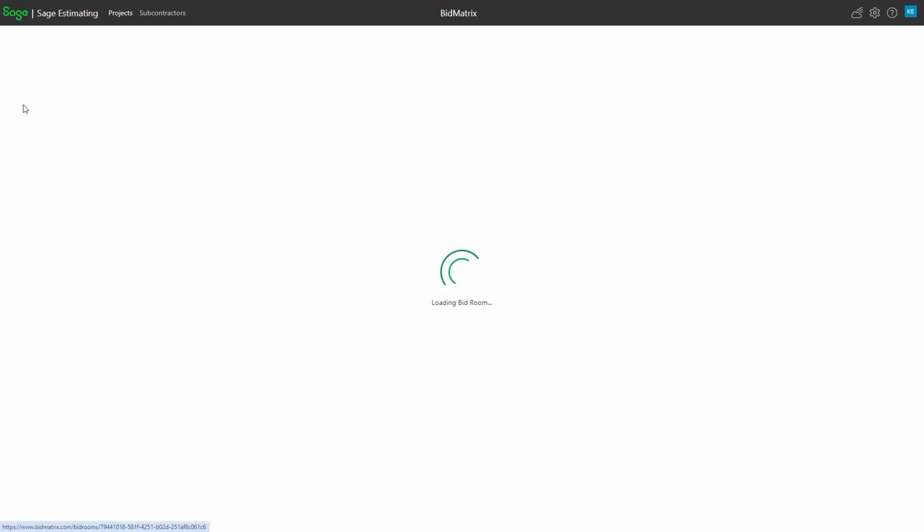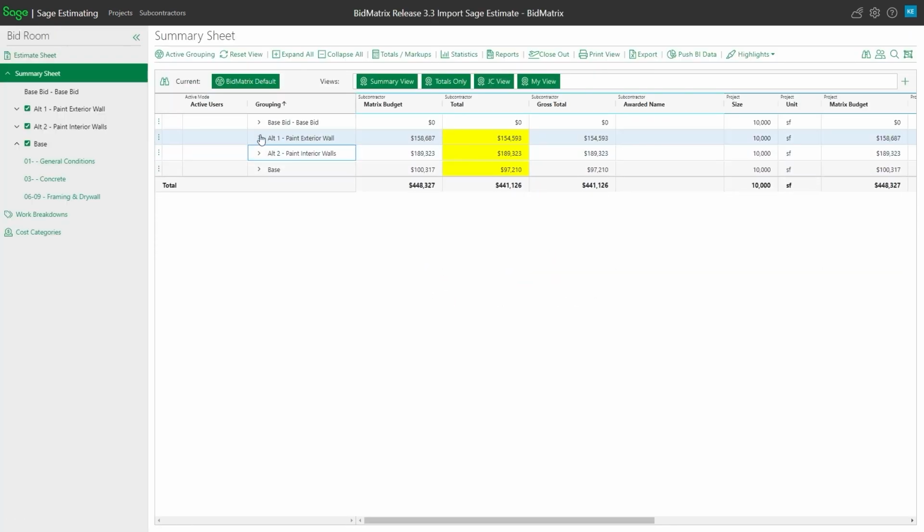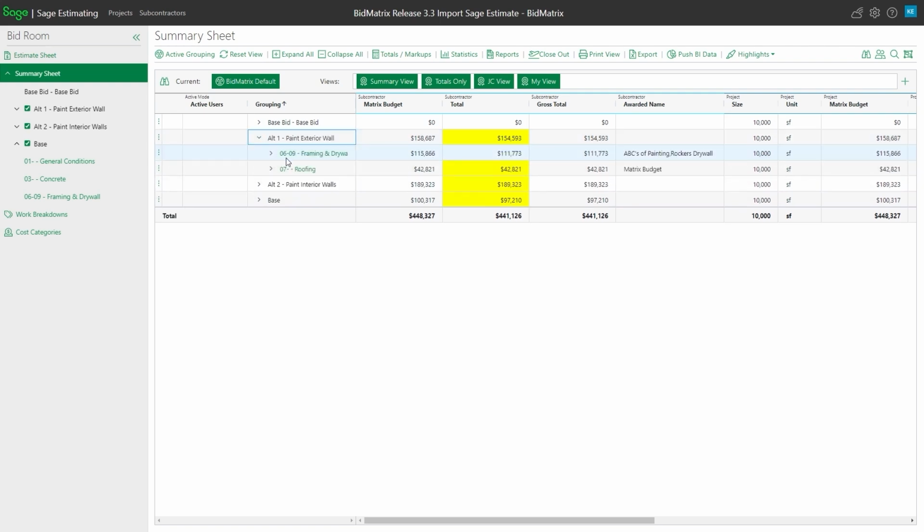got a main level of alternate. So it could be base bid, it could be alternates, it could just be different things that I want to keep track of as major options and so forth. That type of thing. Within an alternate, I get my different CSI kind of divisions, so that way it's grouped and work together by what's considered a bid metric. So you've got alternate the first level, bid metrics being the second level.